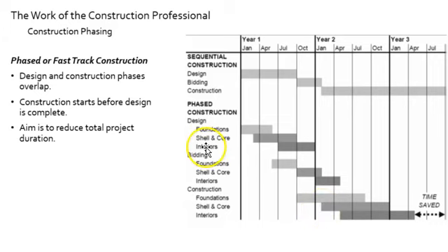And then finally, interiors. Interiors are designed. Again, a certain level of comfort has been reached. Certain big decisions are settled on with the shell and the core, so then those interiors could begin. That design's completed, out to bid, and bid is awarded, and construction begins.